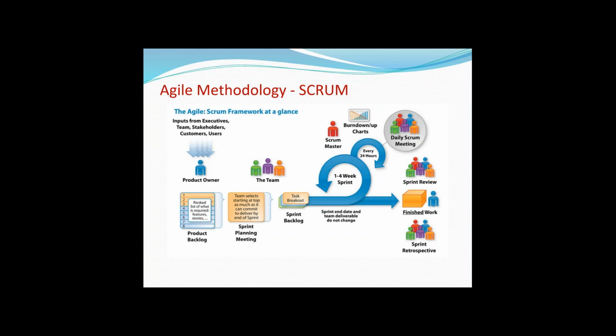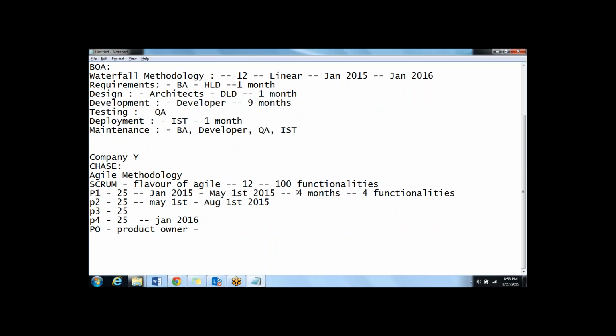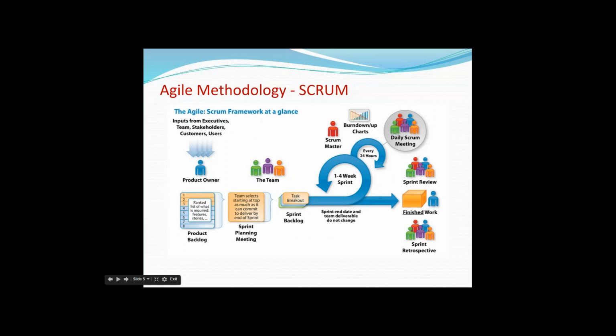Okay, so what exactly is done in this 2 week sprint? Okay, so before I say that answer, out of this 4 months, how many sprints will be there? Everyone, what is the answer? Good. Okay, it would be like 8 sprints. Why? Because since each sprint is for 2 weeks, it means that for every month there will be 2 sprints, and for every 4 months there will be 8 sprints. Okay, so first of all, everyone is clear with the number of sprints that we have.